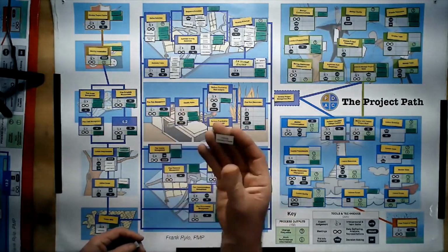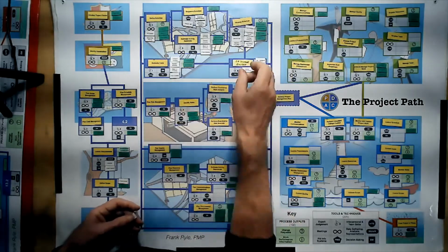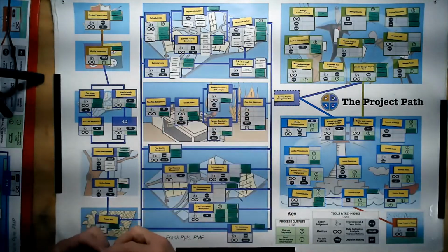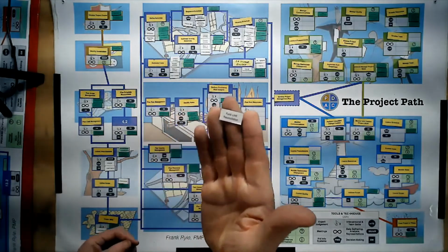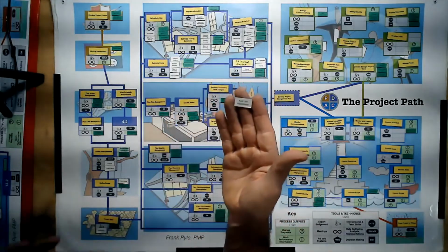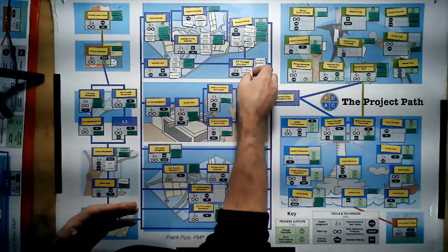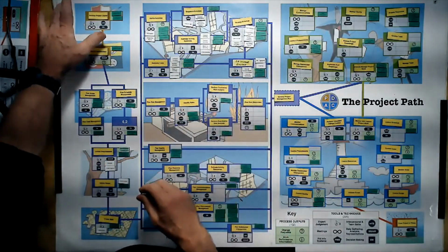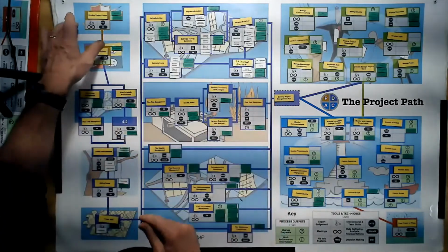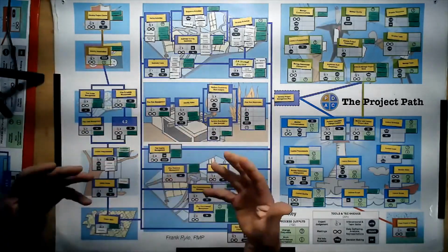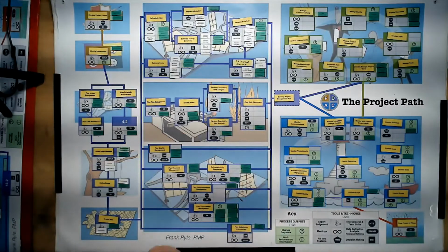Historical information review is very helpful if you're determining the budget to see if there's anything we're missing. If we're missing something, perhaps that would be useful. And the fund limit reconciliation is a checking technique to check back to see what funding is allocated, what funding is available as against what budget we have calculated. So calculated against allocated needs to be checked. Okay, and that's basically what that will do.